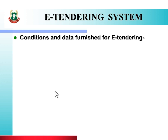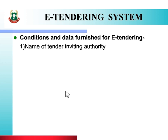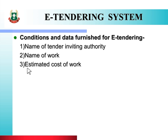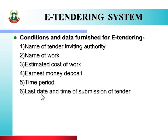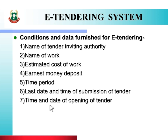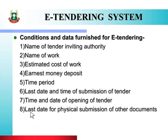These are: name of the tender inviting authority, name of work, estimated cost of work, earnest money deposit, time period, last date and time of submission of tender, time and date of opening of tender, and last date for physical submission of other documents.